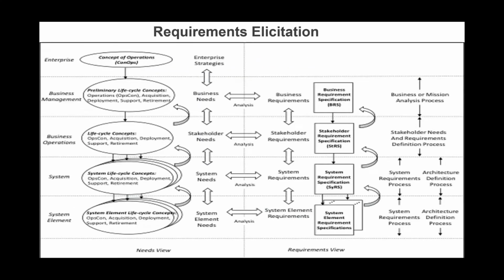Moving to requirement solicitation. This is the process that happens behind the scenes. It's a process not everyone gets involved in, mostly, because requirement solicitation is a process where the business needs are converted into stakeholder needs, which are converted into system requirements. And this is all iterative. This is all based on the design information that you have got at that point in time. And then you go back and forth. Business need can change based on the information provided, or stakeholder need can be toned down or toned up. It can change in a year's time while people are working on a project.